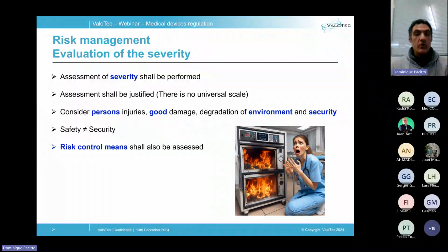The first thing to understand is that there is no universal scale to assess the risk level, and therefore this assessment should be argued using the literature, available statistics or your experience. The assessment of the severity can vary depending on the victim, if it is a person, goods, or the environment, or depending on the situation, and therefore it is advised to consider separately all victims and situations, and broadly the combination of both victims and situations.